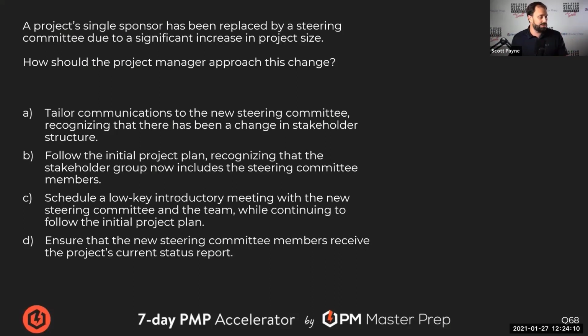So you like A, right? A's your favorite. Sweet. Jete, thoughts? I agree with A because it addresses that we need to tailor our communications to this new group of stakeholders, the steering committee. I like that. And I agree with Natasha that D doesn't work because we haven't made the communications plan. So there's a few steps before we send a status report to the new steering committee, and maybe that's not part of the communications plan or how they want to receive their information. We haven't addressed that yet.